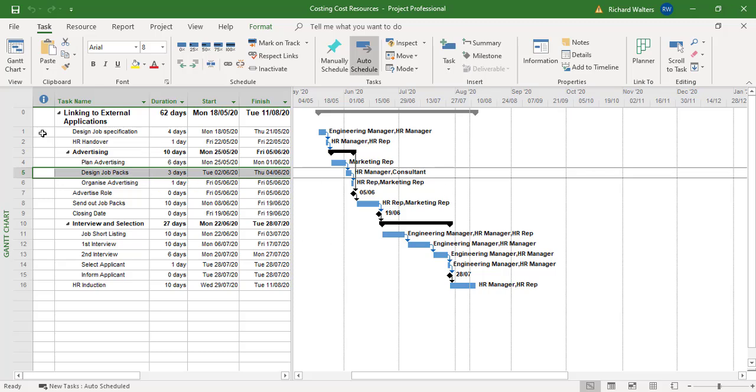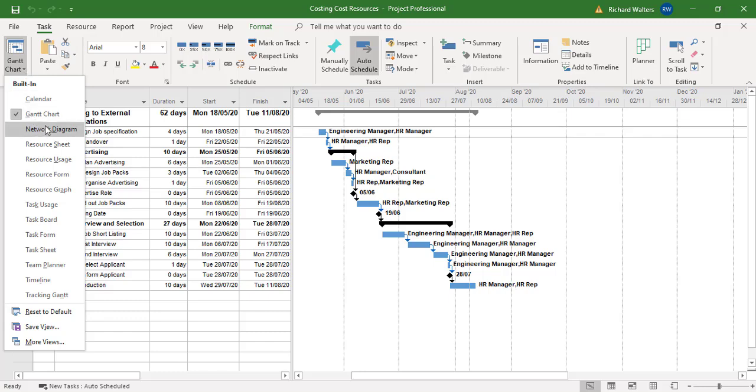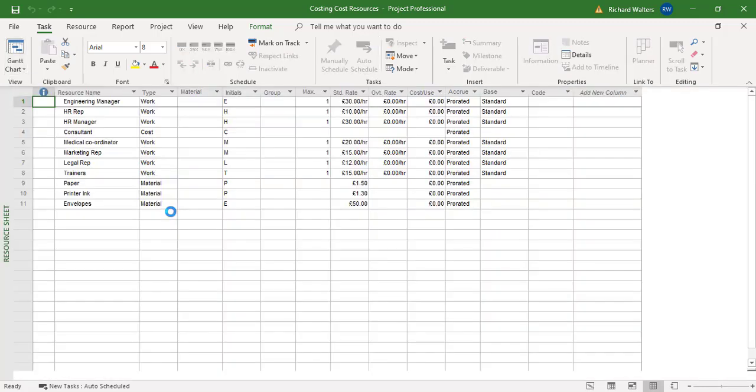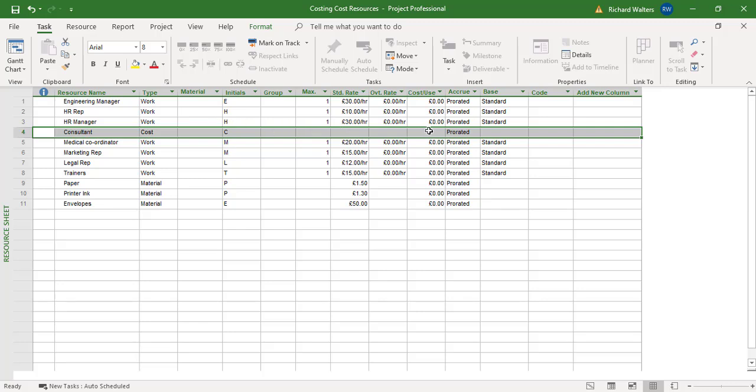If we go look at the resource sheet view, the consultant has no cost against the cost resource. So there's no cost being put in against this consultant. Now this is when project views have become quite important to Microsoft Project. So there's no way now I can get cost put against this consultant, and that's going to be the same for any cost type of resource.